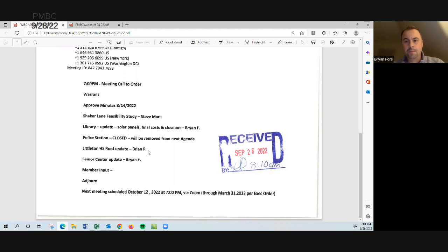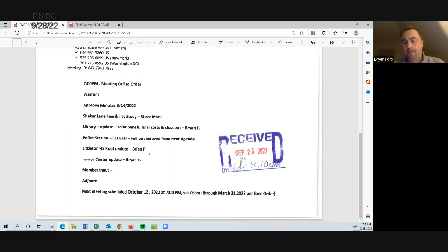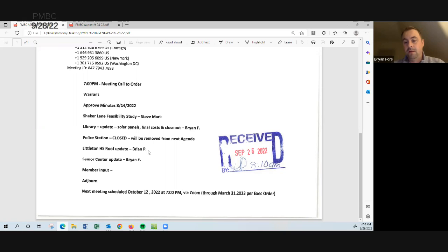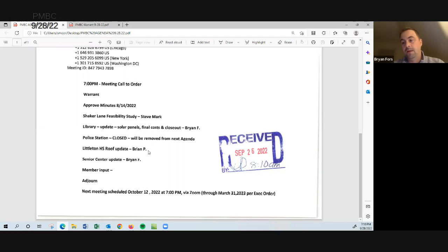Brian. Yeah. To provide an update at the library. I think the last time we spoke, I was still finalizing when the contractor was going to be on site with materials. We were hoping by the end of this month, was informed the day of the 21st. So a week from today that they were going to be mobilizing in two weeks. So that puts us at what next week. The contractor will be on site installing the arrays, the optimizers and the racks up on the library roof. I was told it's a short install. At that time, any other remaining pieces hopefully will be delivered during installation. If not, we will quantify what those are, what's remaining to be done to get the system operable.